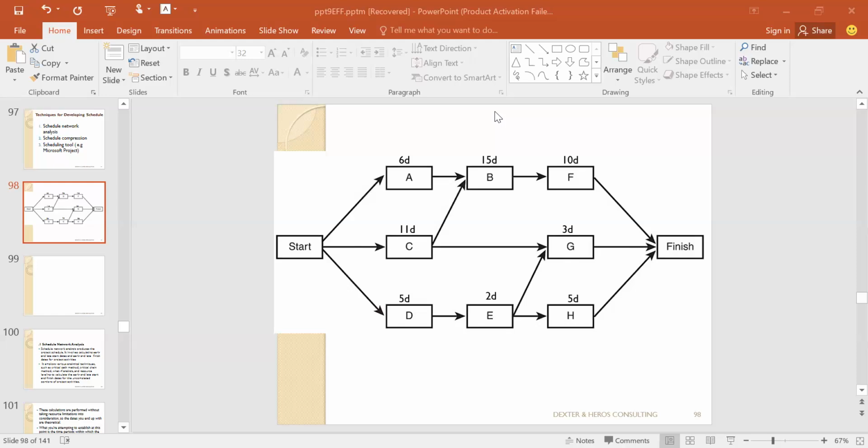Let's interpret it. Each of the parts will be subtracted from where? From the highest. What's the highest? 36. But we have an order of doing it. Where do we start from? From that same 36. Am I correct? Because we start from the highest and retrogress. So the first float you will find is the highest one. 36 minus 36 is 0. That is, the float for that part, which is part 2, is 0. So you go to that part.